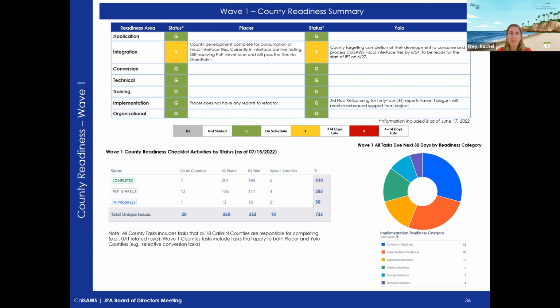were in those BPR sessions, that have that historical context and knowledge, are reviewing the change discussion guides so that the right changes are reflected as part of the submission of the change discussion guides. That's in addition to, we're reviewing something that's called the process change inventory. That process change inventory is exactly what it says: it's an inventory of all of the changes that I've identified between the as-is and the to-be.